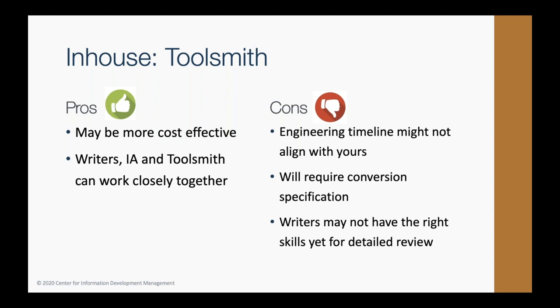One thing I want to draw your attention to in terms of the cons of this approach is that the engineering timeline might not align with yours. Unless you have some sort of management edict that says, yes, we want you to prioritize developing a conversion script or scripts for us over the other work that you're doing, that could push out your conversion timeline by a factor that is beyond your control.